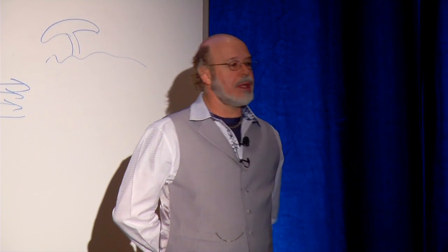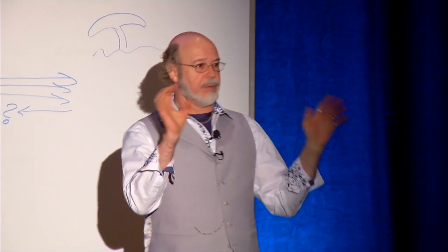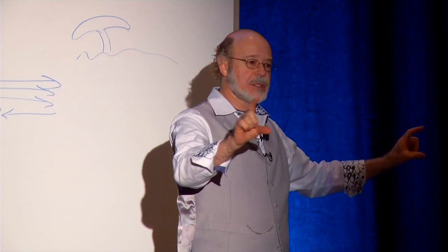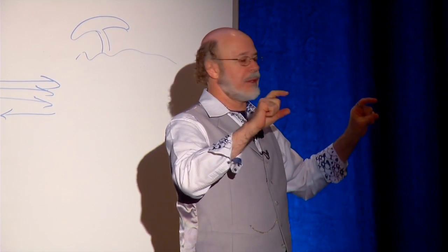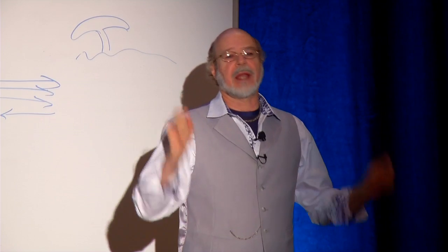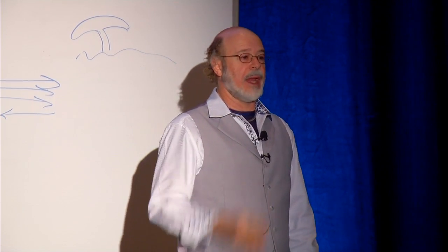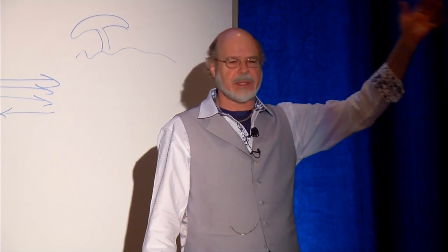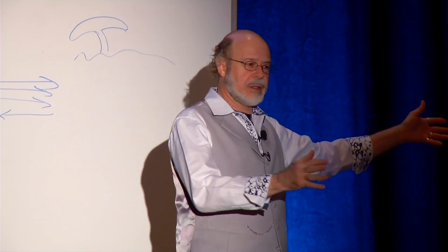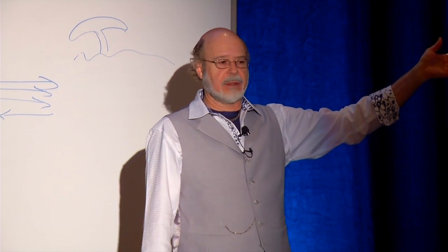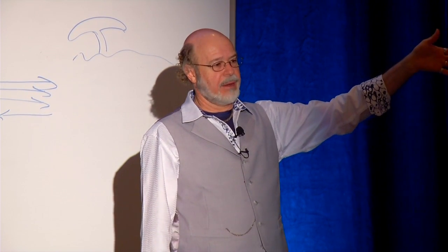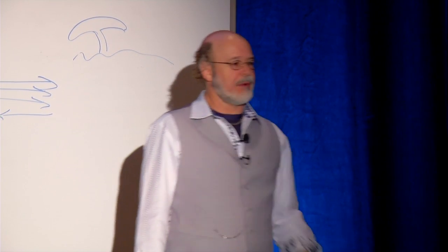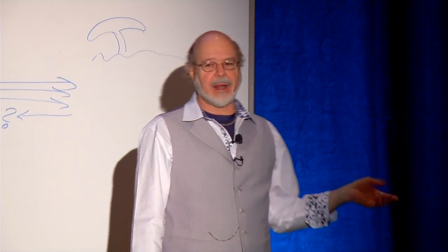Basically, it also says when we hit this point, I'm telling them, you've known for a long time this red bar is coming on the chart here. This is a big milestone. It says right in front of it, on one of the milestone markers, this is the last day you can give me anything, and know it's going to go in. You can give me the whole book markup and hand it to me on this day as a package, and it will make it in the book. But if you go after this date, I can't guarantee it. Now, I almost always manage to get everything in, but I don't want anybody to ever rely on that.